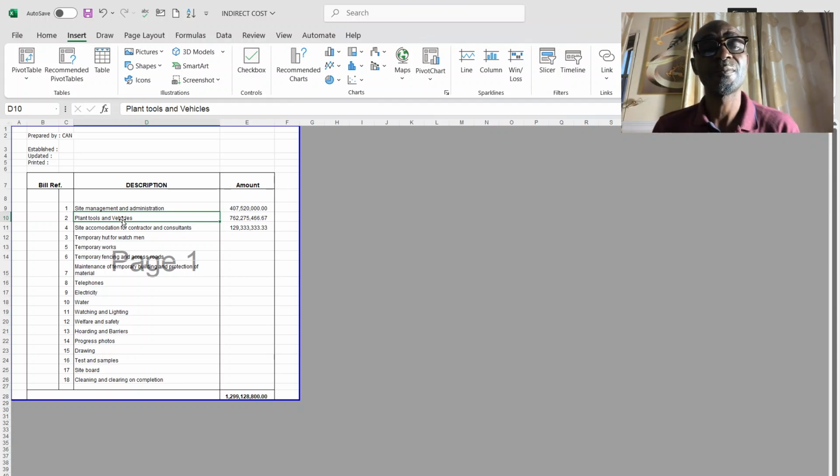So for an excavation, you have, say, in the bill, 300 cubic meters of excavation to do, and you say you have 1 month to do the excavation. I'm just giving an instance. You have 1 month, 2 months, or 3 months to do the excavation. So you now decide how many cubic meters you want to do per day for that period of 3 months, so that you make sure you accomplish within 3 months and demobilize the equipment.